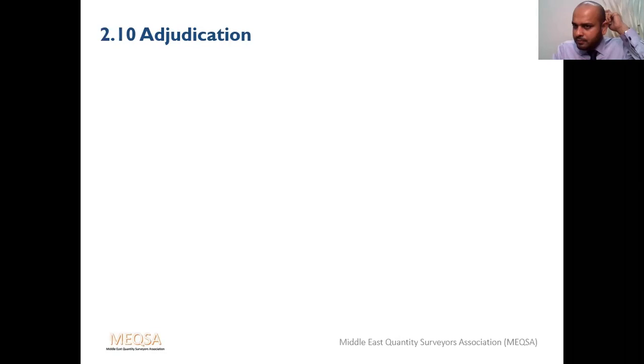They have a construction law. The adjudication must be followed in construction contracts. So by law itself, they are bound to go for adjudication in case of an issue before they reach the court procedures. So in that, if it is a construction contract, there is a definition of which contracts come under the Adjudication Act or the Construction Act. This is the adjudication by law.